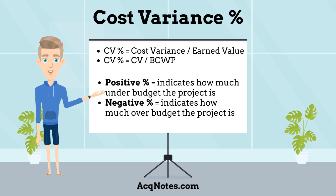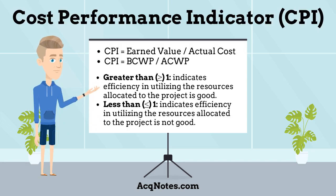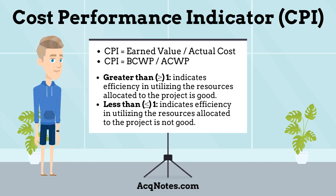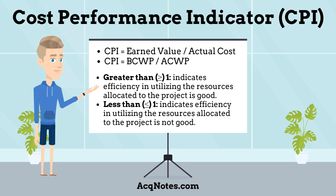A negative percentage indicates how much over budget the project is. The third cost variance type is Cost Performance Indicator, or CPI. CPI can be calculated as: CPI equals Earned Value divided by Actual Cost, or CPI equals Budgeted Cost of Work Performed divided by Actual Cost of Work Performed. CPI is an index showing the efficiency of the utilization of the resources on the project. A CPI greater than 1 indicates good efficiency; a CPI less than 1 indicates efficiency is not good.